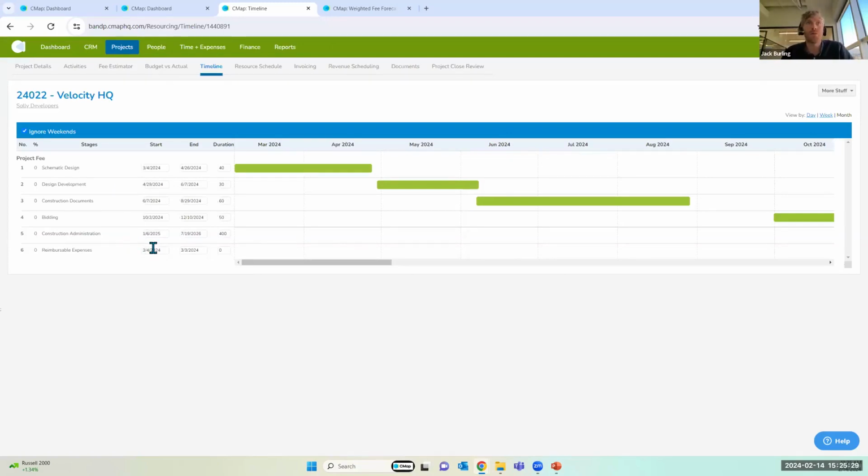But that is a feature that will be released this year, I'm led to believe as early as the summer, along with other resourcing improvements that are being made. Timeline enhancements like the ability to add predecessors would mean that if you extend one phase by 4 weeks, it will automatically push the rest of the project along by 4 weeks. So you wouldn't need to manipulate each individual phase. Like a group selection, you would be able to do that at some point soon with those enhancements.